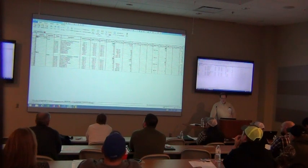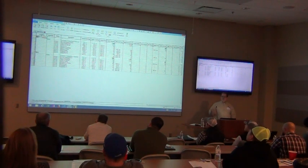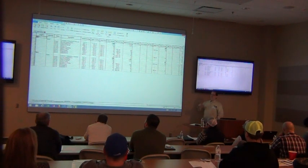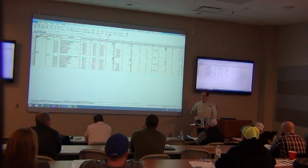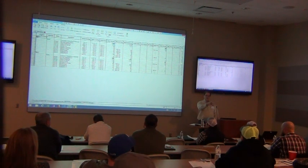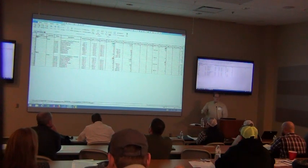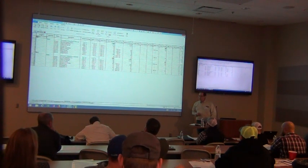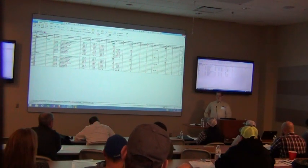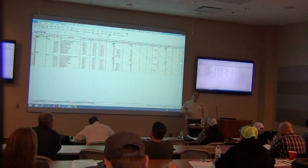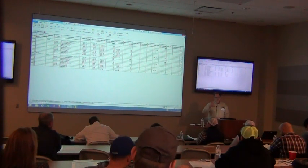These headings are really very powerful because they don't have to be set up upfront. One of the biggest challenges is that a lot more often than just the base bid, people need all these different options and variations — separating things out and doing other things with the estimate becomes just as time-consuming as the initial takeoff. For example, let's say that for whatever reason, I need to break this out by what month this work is going to be done — it had nothing to do with how I built the estimate, but somebody came back and said 'I want to know what's done in February versus March.'